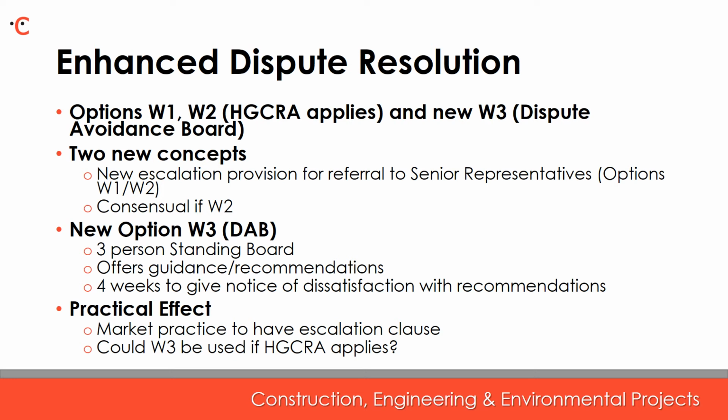Parties are free to reject or accept the recommendation of the Dispute Avoidance Board, and if they disagree, can then proceed with, for example, adjudication if necessary. The contract encourages consensual resolution of disputes. No formal dispute resolution proceedings can be instigated unless the parties reject the recommendation of the Dispute Avoidance Board.